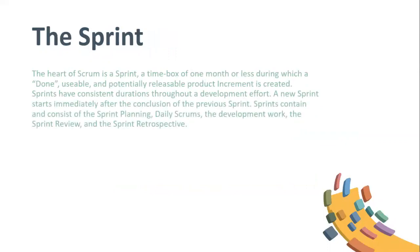The sprint: the heart of Scrum is a sprint, a time box of one month or less during which a done, usable, and potentially releasable product increment is created. Sprints have consistent durations throughout a development effort. A new sprint starts immediately after the conclusion of the previous sprint. Sprints contain and consist of the sprint planning, daily scrums, the development work, the sprint review, and the sprint retrospective.